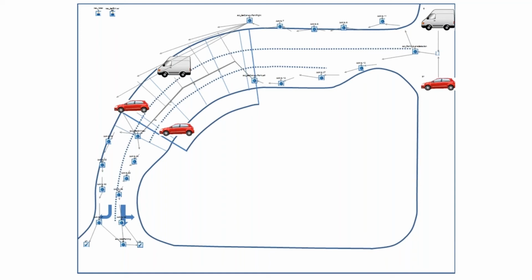And if there really isn't a most likely, you know that you're using a uniform distribution. If they're giving you 3 options, then you start to build it in from a triangular perspective. And that's really how knowing our data in this situation, and knowing that we had some challenges with our data set, made it important to inform what type of distributions we had.